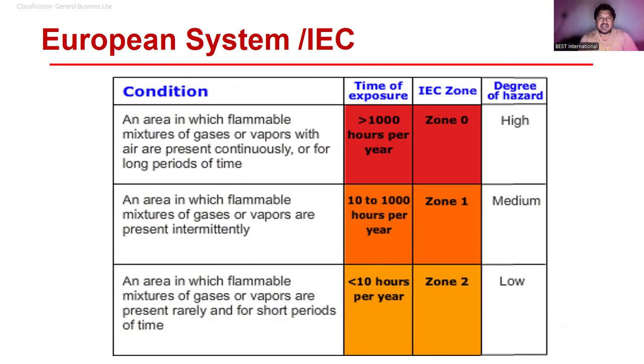If you are signing the permit and later on you are the one doing isolation and LOTO and all that, it is better to have a separate permit for isolation. Like the EULB permit, and Aramco is very famous for this. That's why, before signing the permit, they first issue the isolation LOTO permit if needed.